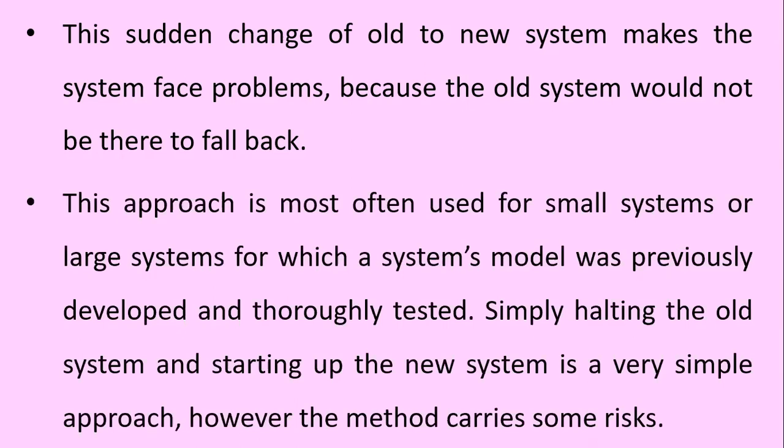This approach is most often used for small systems or large systems for which a systems model was previously developed and thoroughly tested. Simply halting the old system and starting up the new system is a very simple approach. However, the method carries some risks.